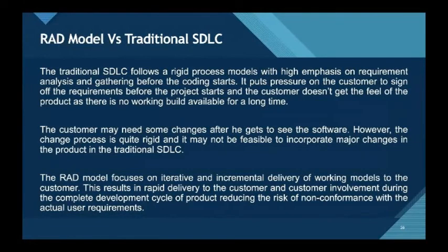RAD model versus the traditional SDLC. The traditional SDLC follows a rigid process model with high emphasis on requirement analysis and gathering before the coding starts. It puts pressure on the customer to sign off the requirements before the project starts, and the customer doesn't get the feel of the product as there is no working build available for a long time.